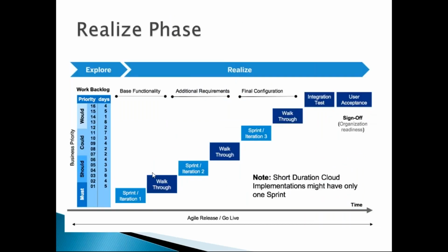I'll take the questions. So this is a way where we divide the timeline, guys. The customers can choose whether they want to break it down into 2 parts or 3 parts. And if the project is very complex with a multinational implementation, like multiple countries and all, then they can even increase it to 4 rounds, 5 rounds also, depending upon the project scope.